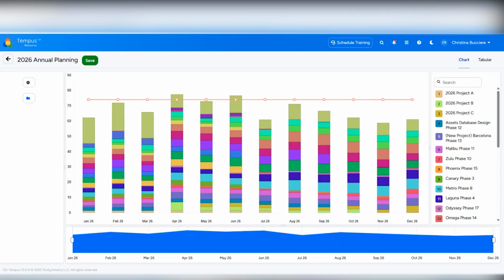Once you're satisfied with the sequence of your projects through modeling in What If and maybe using a portfolio planner, and you are comfortable with the utilization levels of all of your impacted teams, you can even then bring this project plan to life in your live Tempus environment by exporting the model data through a pivot grid in Tempus and re-importing it into Tempus through an assignment import. Basically, the intention there is to shift your project start and end dates to reflect this new sequence. We have a great video in the use case section of the Help Center on exactly how to do that.